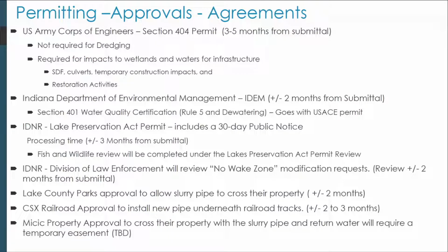IDEM will regulate under Rule 5 the soil erosion and sediment control aspects of the SDF and the slurry pipe routing and temporary roads. And like I said a minute ago, the dewatering practices. Those permits go hand in hand with the Corps permit.